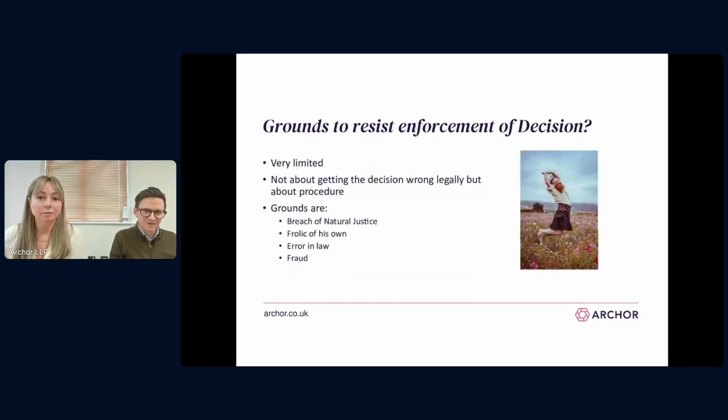Okay, so very quickly, grounds to resist enforcement. As we mentioned earlier, the TCC is very supportive of adjudication, and the grounds for resisting enforcement and the likelihood of the court allowing it seems to be getting narrower each year. Probably the key grounds to resist enforcement are a lack of jurisdiction, or a breach of the rules of natural justice.